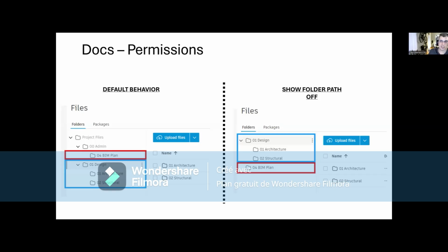And if you need something out of the architecture or structural folder, you just reach out. But yes, you can dial it in if you want. We personally have earmarked the electrical, mechanical, structural, and plumbing engineering roles for electrical, mechanical, structural, and plumbing submittals in Autodesk Build. So when those submittal types come in, they automatically go to the correct person.